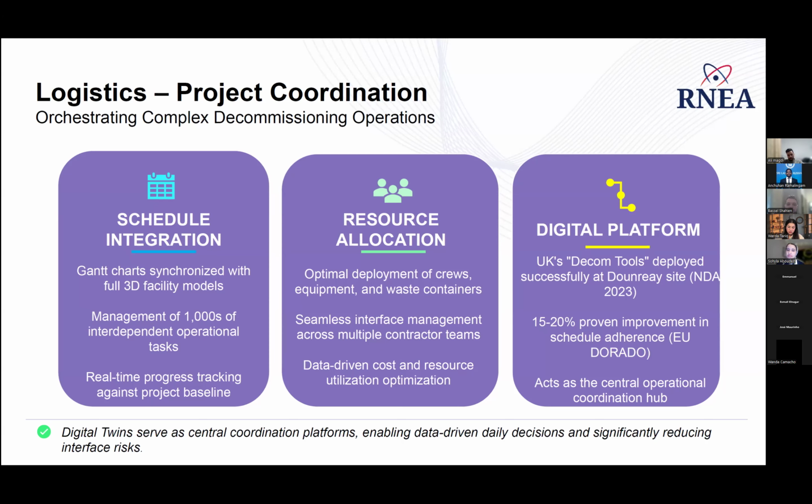Where do we need crews today? Which equipment is available? Where should waste containers be positioned? So platforms like the UK's decom tools deployed at Dounreay have demonstrated 15 to 20% improvement in schedule adherence. That's the value of having a single live source of truth.